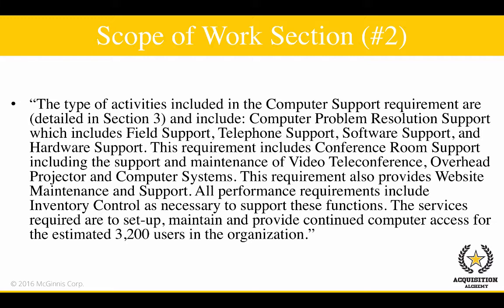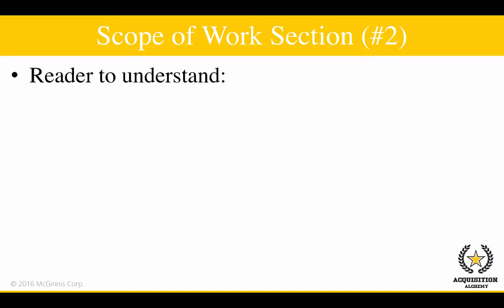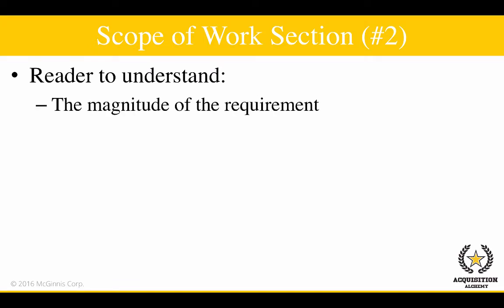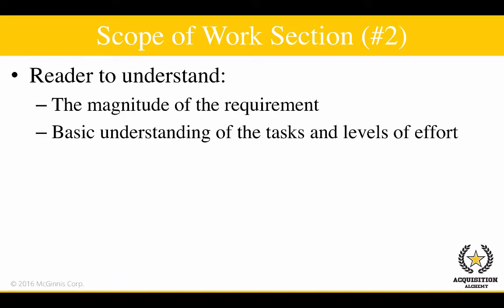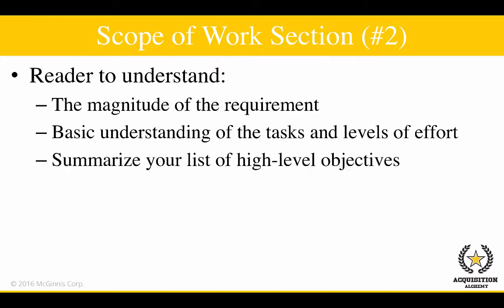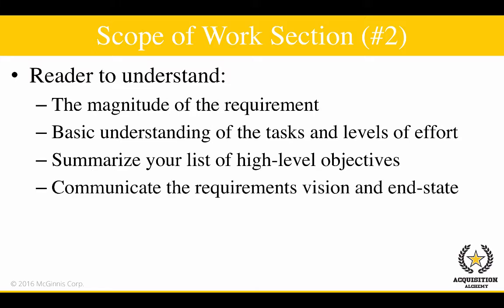The services required are to set up, maintain, and provide continued computer access for the estimated 3,200 users in the organization. In this section, you want the reader to understand the magnitude of the requirement and have a basic understanding of the tasks and levels of effort necessary to successfully perform the contract. So rather than listing out every individual task to be accomplished and elaborating on it, it would be more appropriate to summarize your list of high-level objectives and communicate the requirement's vision and overall desired end state.